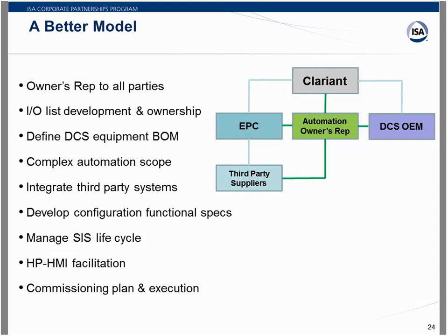The automation owner's rep took over defining the DCS equipment bill of material and then reviewing and providing feedback on what the DCS OEM came back with as far as a bill of material.